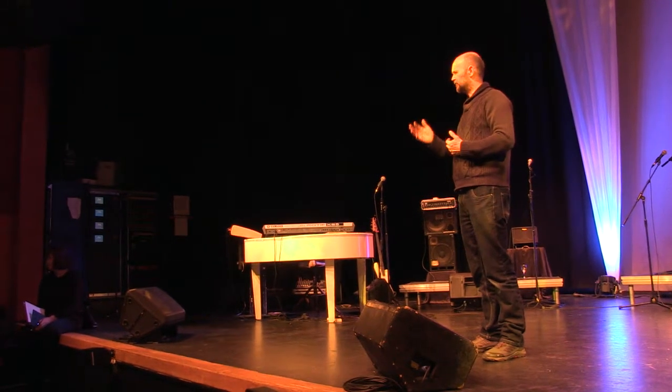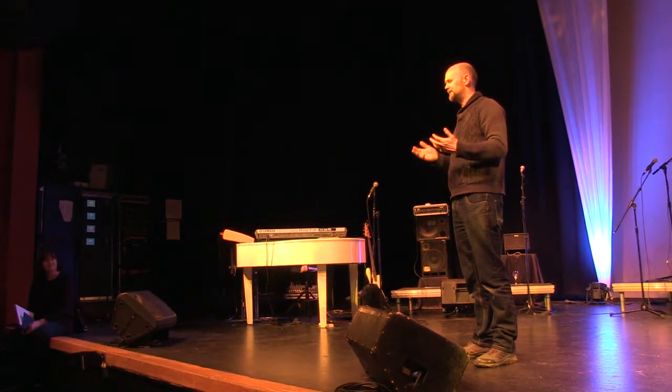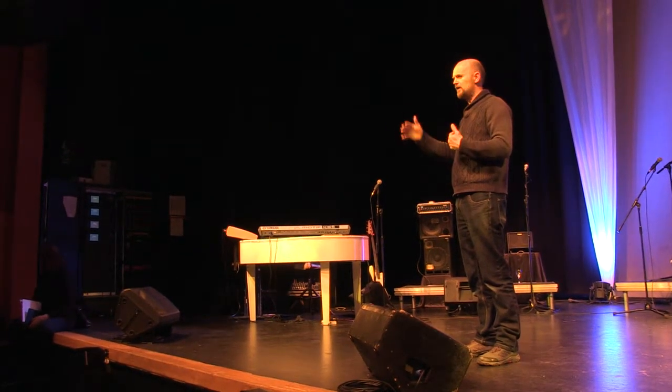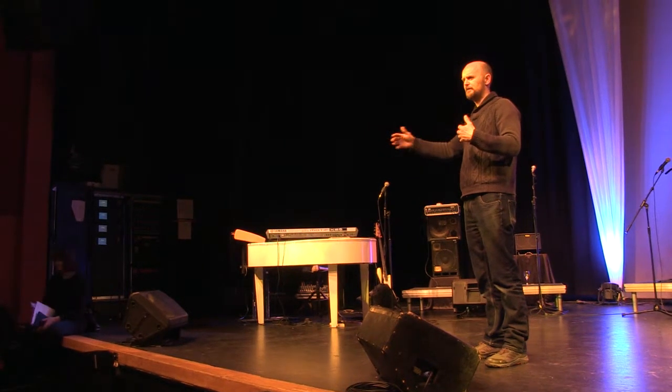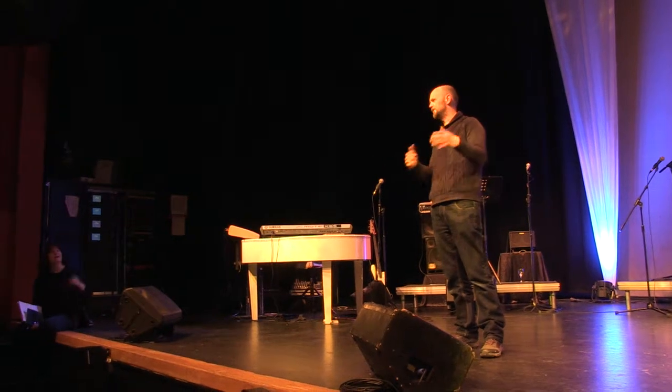Connolly actually told me a good way of working it out. Even on a focus, if you've got 5 minutes, 6 minutes a lamp, and you've got 60 lamps, you're looking at hours to do something, rather than thinking, right, I'm ready to go, I'm ready to focus, I want it done before lunch, you know, thinking you can do it in half an hour.